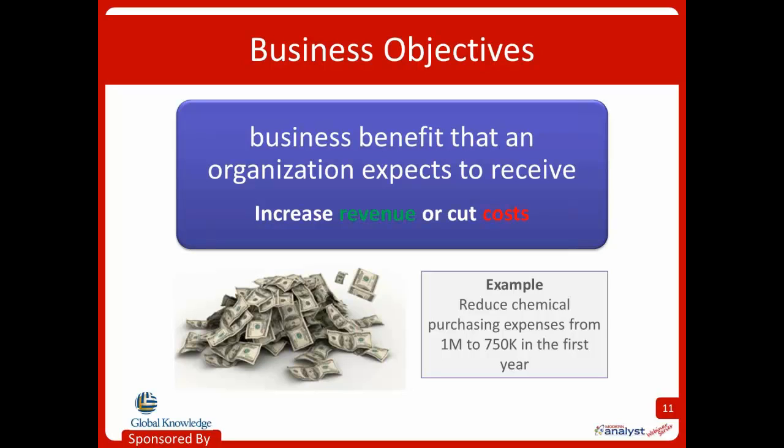And if you can do that, it just gives such a nice clear reason for us to take on a project and drive our prioritization to. And we're going to see what that means in a little bit. Now sometimes I hear about IT projects that are doing things like, well, we've got to combine 7 systems into one. Okay, that is not a business objective. It may be a measurable objective, but it is not a true business objective. It's really a solution to a problem.